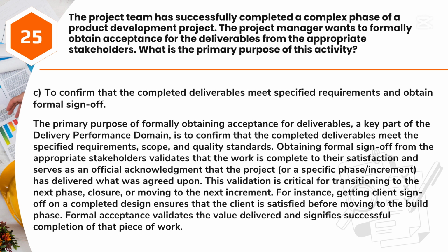For instance, getting client sign-off on a completed design ensures that the client is satisfied before moving to the build phase. Formal acceptance validates the value delivered and signifies successful completion of that piece of work.